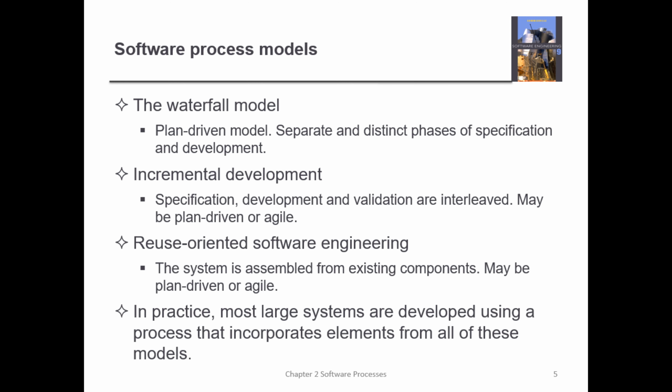Now in waterfall, it is a plan-driven model, so it takes the plan-driven approach. That means you have to plan everything before you start the software project. So this waterfall model separates the phases of the software development, and these phases are distinct. They don't interrelate. You have to first finish the first phase before you continue to the next phase.